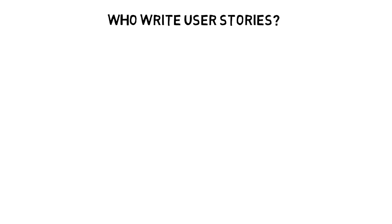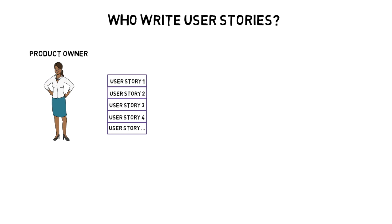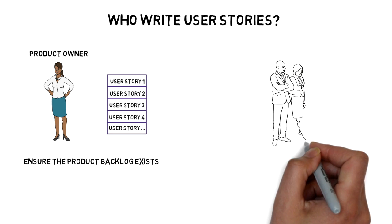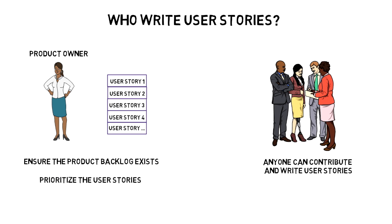So who writes the user stories? The product owner has the responsibility to make sure a product backlog of user stories exists. However, it doesn't mean that the product owner is the one who writes them — the more people join in the conversation, the better, and anyone can contribute and write user stories. The responsibility of the product owner is to confirm that they match the INVEST criteria and to prioritize those user stories in the backlog.